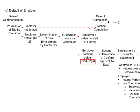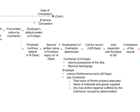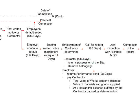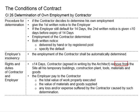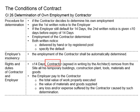If the employer still remains in default, the duration given is 14 days. Within these 14 days, if the employer still remains in default, the determination can happen. Before that, there should be a second written notice, given within 10 days before the expiry of these 14 days. After the second notice, if the employer still remains in default, the employment of the contractor can be determined. Within 14 days, the contractor will need to return possession of the site to the employer and remove his belongings, with written agreement by the architect — to prevent the contractor from removing items which are supposed to remain on site.